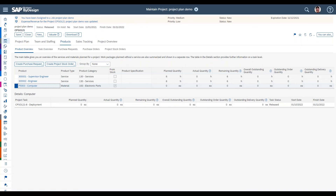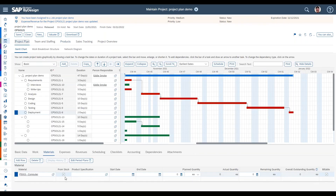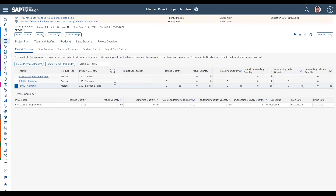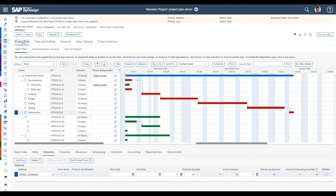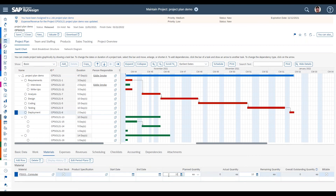When planned 'From Stock,' you'll create project stock orders to allocate those materials to your project and subsequently consume them from those allocations. When left unchecked — procured externally — you'd plan through purchase requests and purchase orders, with the supplier shipping via a goods receipt to consume them into the project. You can also indicate a product specification, dates when the product is needed, the quantity required, and whether it's billable or non-billable to the customer.